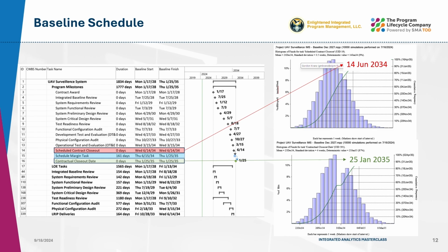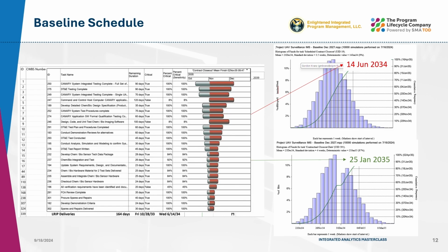Agreed. Note that we only use schedule margin at the end of the program, but it can also be used prior to any interim milestone. That's a very interesting point. I've seen several programs where the schedule margin was allocated discretely for each key event. The SRA also helps to identify tasks within the schedule that should be proactively managed due to their potential impact on the closeout date. In this case, integration and formal testing activities are at the top of the list.